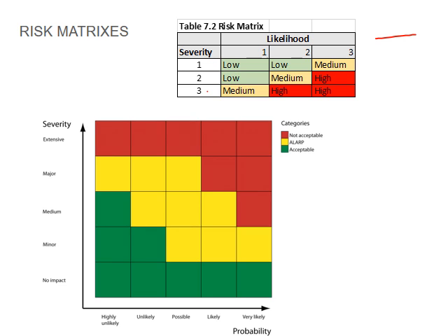So for instance, if it's in a built-up area, the chance of it actually happening is 2. So instead of just putting up danger tapes, you may put up barricades. So in this instance, your risk will be highlighted as a high.